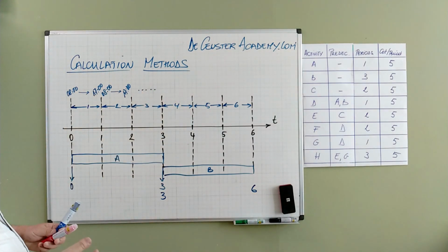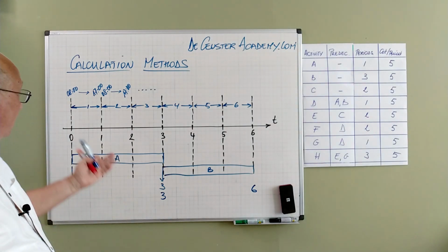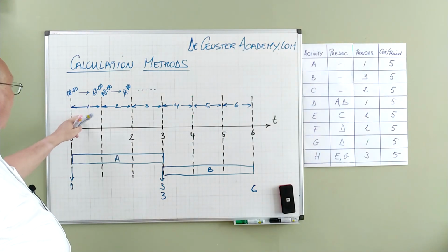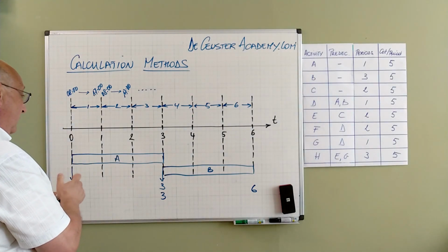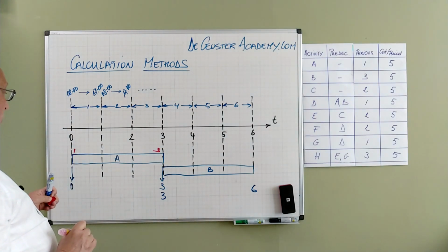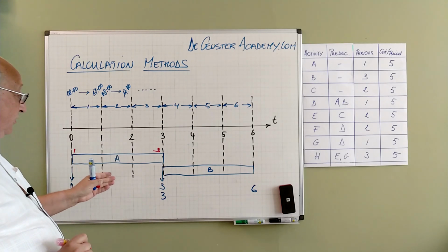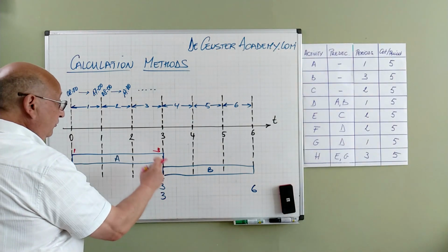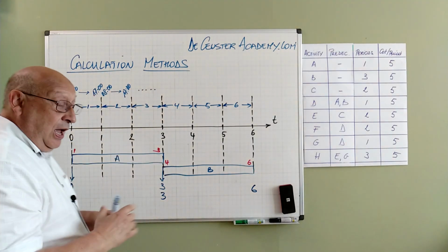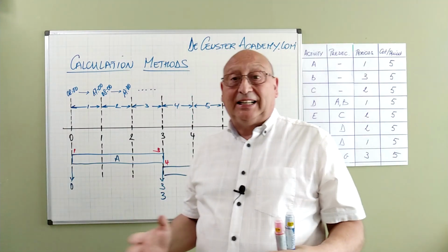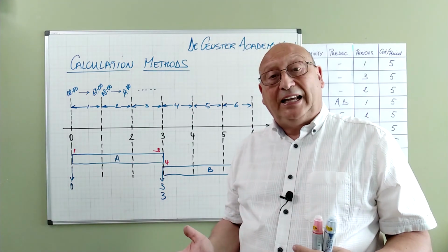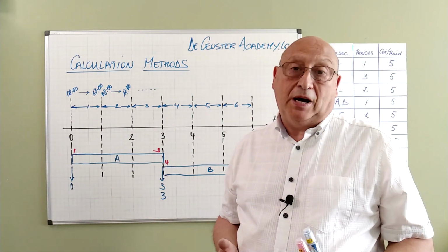In the calculations that we use, when we use the ordinal numbers, we have it a little bit different. We start from 1 till 3. So we have 3 periods from 1 till 3. Then here we start from the next period, 4 till 6. I told you both methods are basically giving the same result, so you have to take into account that this method exists and both of them are correct.